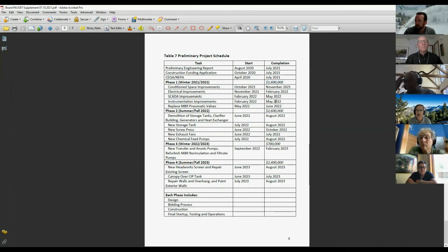Yes. Realistically, when we start paying, this is pretty small, quite frankly, in terms of cost. But really, this is when we get the Tescos and the electrical contractors out. That's pretty substantive in those two alone. So yes, obviously we'll pay monthly, as we receive the contractors' progress payment requests. But correct, spring would be when we would start seeing the bulk of the 1.6 million coming in. Thank you.